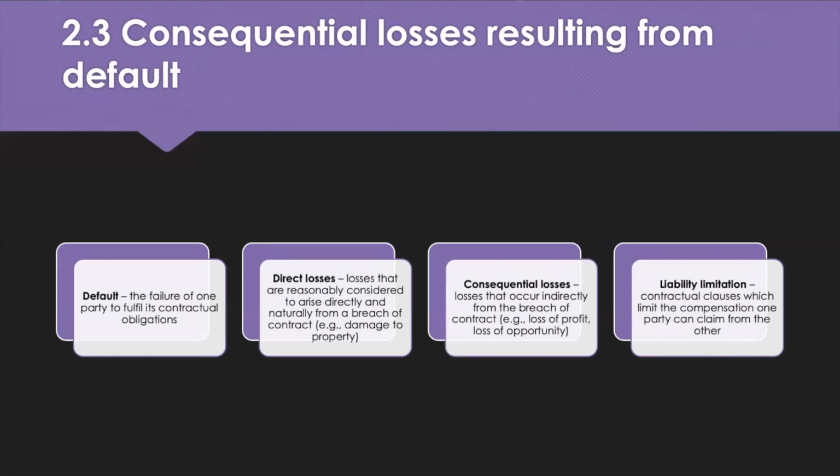So procurement professionals need to limit the damages that are due to suppliers if their organisation defaults on its contractual obligations, and protect the project from the effect of breach of contract by major suppliers. It's in the interests of the project that recoverable losses are unlimited, and suppliers would wish to restrict those losses by excluding consequential loss. But contracts generally allow for recovery of direct costs, while including a limitation of any indirect costs. Without these limitations, the project may be considered too high a risk for suppliers to enter into. And contracts that limit the supplier's liability are often the most cost effective.